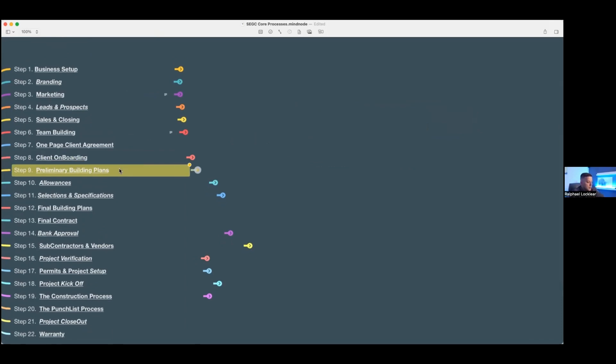Any questions with that? All right, next stage is the preliminary budget. Now, we've onboarded the client, right? We've got them set up. Before we start anything, you have to start out with a preliminary budget, a range. This is what we do. Hey, where are we trying to stay at? $100 to $500, $1 million to $5 million, $250,000, or in our case, $500,000 to $850,000. So you establish the preliminary budget, because that's going to go along with your preliminary building plans.